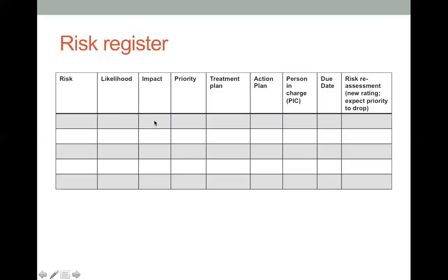Based on our consultation with stakeholders, we are going to lose $150,000. And based on our company standard, losing more than $100,000 would be considered as high. How high is that? Well, it's 5. So the impact here is 5. It's severe, catastrophic actually.